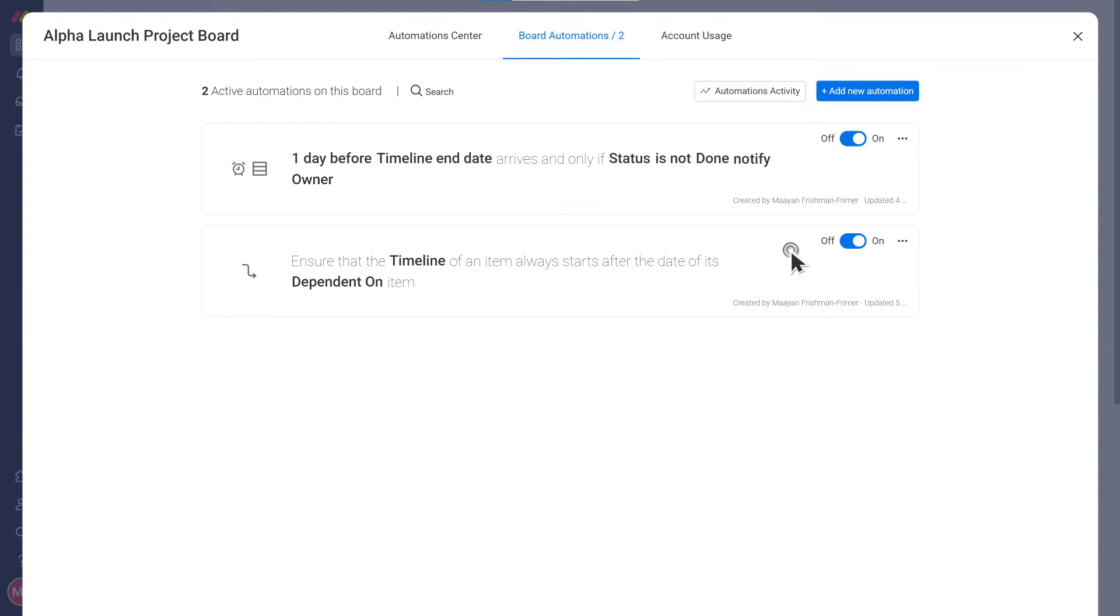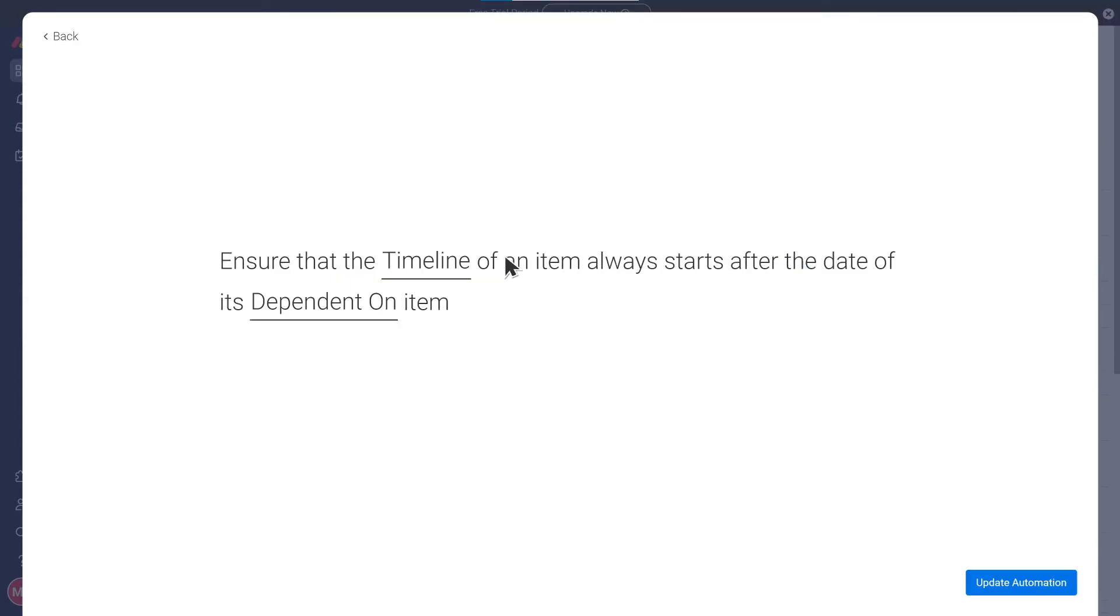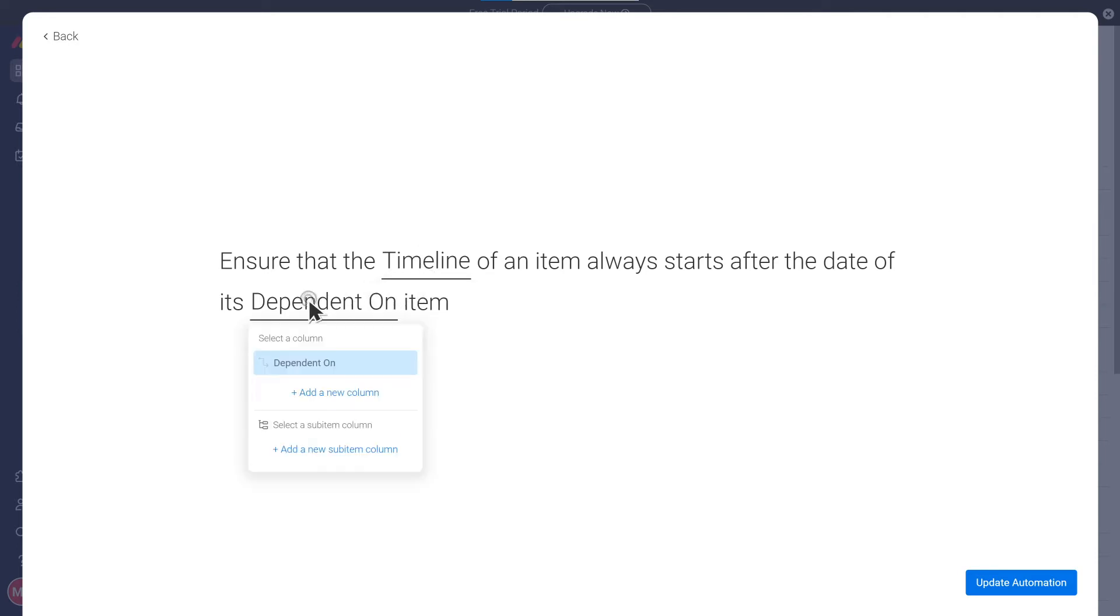So, for example, this automation will make sure the timeline of any task always starts after the date of the task it's dependent on.